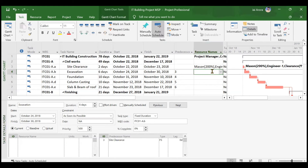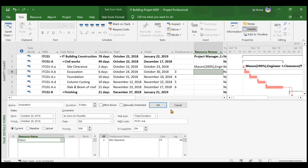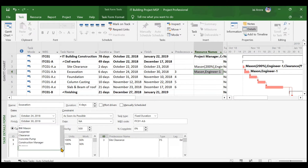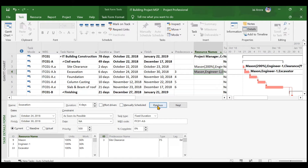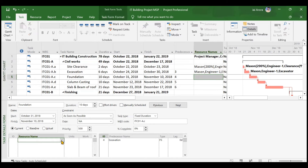Moving on to excavation: there is one mason, one engineer, and one excavator equipment resource. Add mason — it is straightforward. Add engineer one, then add the excavator. Since the excavator is a work-type resource, it has units and respective work. One excavator working six days at 10 hours per day gives 60 hours of work. Similarly for mason and engineer.